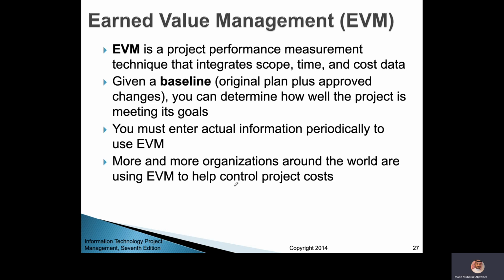follow the variances that you get from the time management, and you are meeting the deadlines or not, this is not sufficient, because you might meet the deadline, but you spend more budget. So that's not good. No. If you follow the cost estimate only, okay, you did not exceed the budget, but if you look at the time, you are behind the schedule.